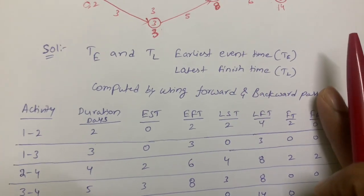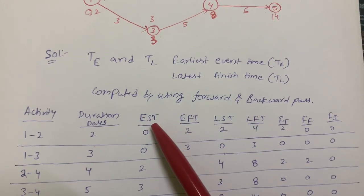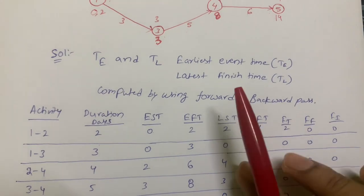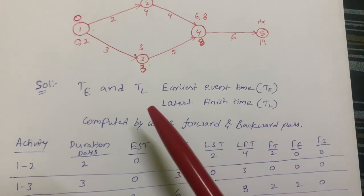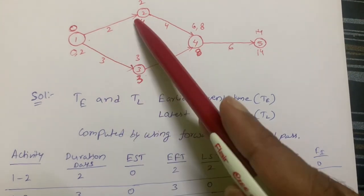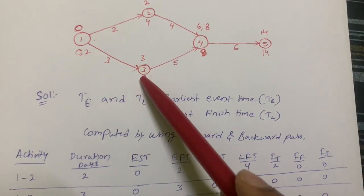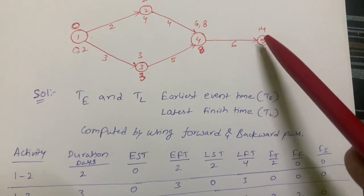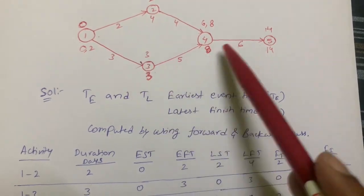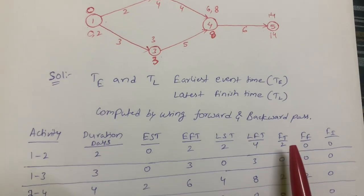Next I'm going to calculate EST, EFT, LST, and LFT — earliest start time, earliest finish time, latest start time, and latest finish time. To calculate these we use forward and backward pass. The forward pass follows paths 1→2→4→5 and 1→3→4→5. The backward pass follows 5→4→2→1 and 5→4→3→1.